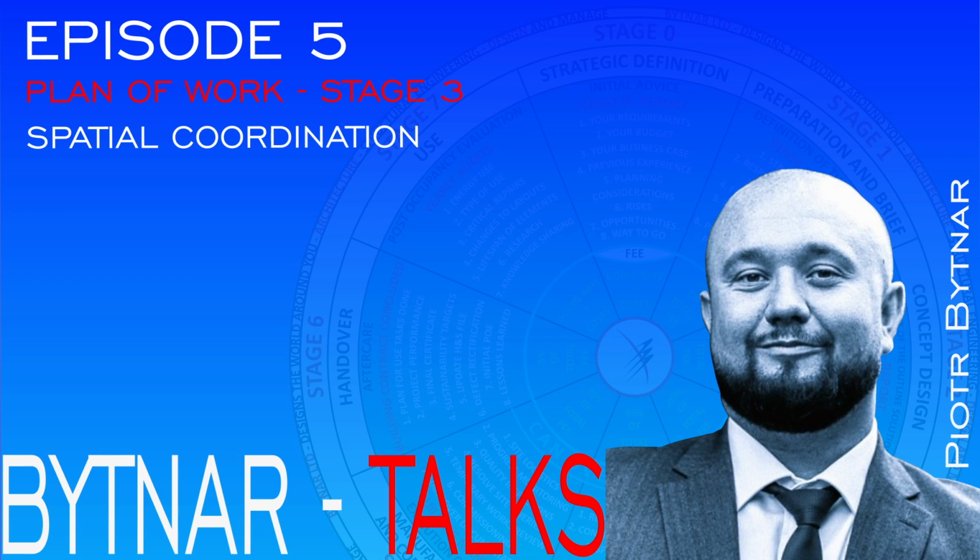I call it consensus building. Stage 3 involves extensive collaboration among stakeholders, architects and structural engineers, to solidify a shared vision for the project. The vision agreed on in Stage 2, concept design. It is not the place to change the brief, but to assure the concept was correct and to establish size, place, orientation of critical elements, load carrying paths, stability system, structure, foundation interaction, and possible differential movement of elements.